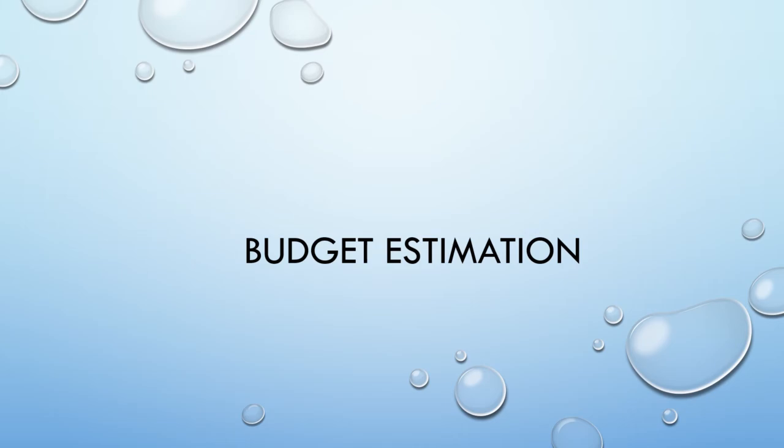First, define the cost estimate's purpose, develop estimation plan, define the characteristics determining cost estimation techniques, identify rules, assumptions, and obtain data, develop point estimates, conduct sensitivity analysis, conduct risk and uncertainty analysis, document the estimate and present to management, and finally update the cost estimate.